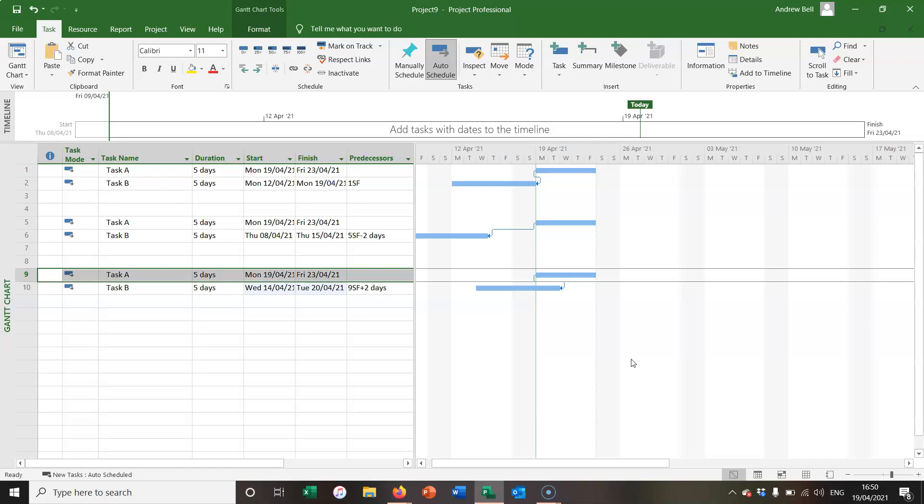These start to finish relationships are very infrequent in Microsoft Project. In 20 years I've only seen one example, and that was that the over transport of goods can't finish until overnight security has started.